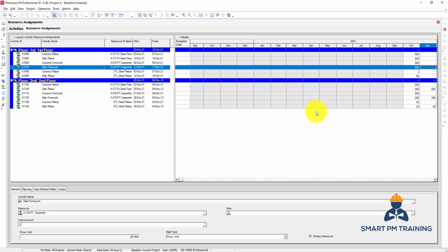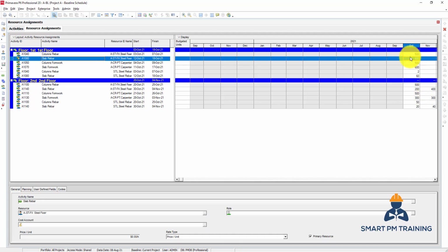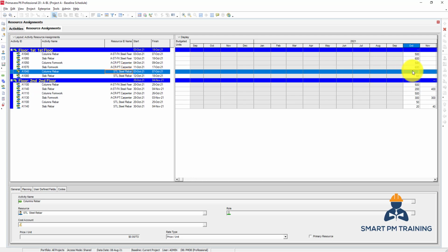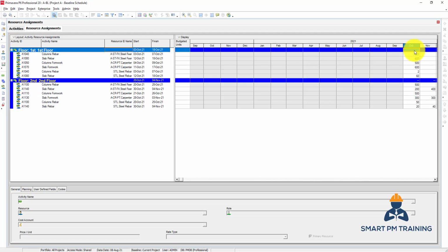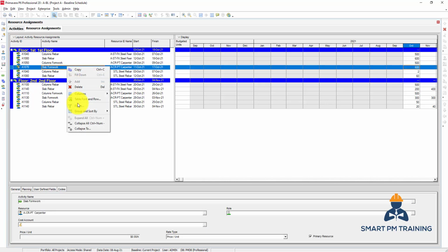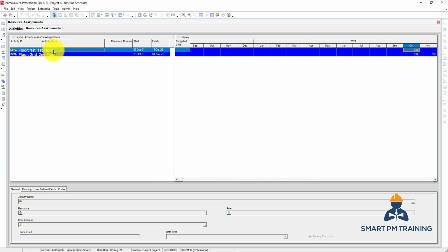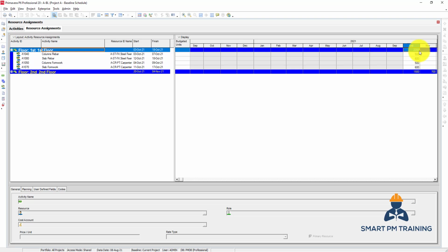average. Sometimes in your reporting, you want to deal with labor hours. So you want to say for first floor, I have this amount of hours, but it will not show you the total here. Okay. And why is that? Because I have also steel rebar quantities assigned. So in Primavera, it cannot just make the sum of labor hours plus tons. If they find different units, they will not give you the overall here. But what you can do, if you want the labor hours, for example, you can filter. I want the resource type equals labors only. In this way, I removed the steel rebar.